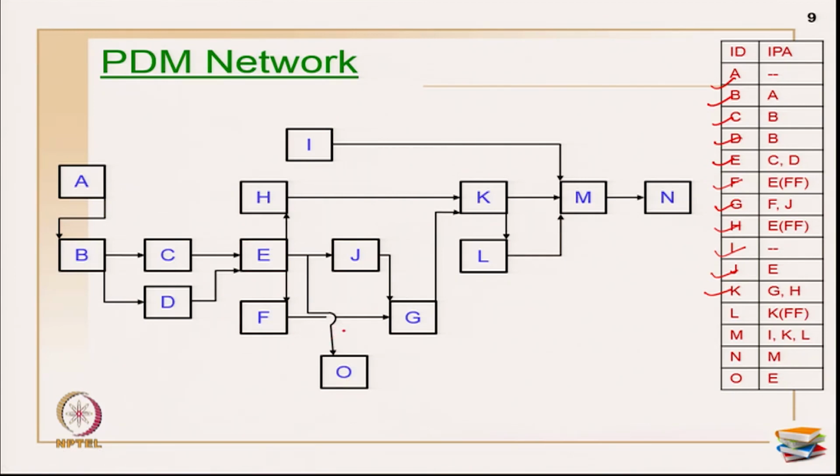I have used a cross line arrow mark here, with the predecessor E, okay. This is also wrong, so it has to come till the end of this box, okay. It should not come in the middle. So this is how I draw my network diagram. Follow some pattern and, as far as possible, try to avoid crossing over of arrows. This O could have been drawn here, leaving a space on either side, so that this crossing over can be avoided, okay.